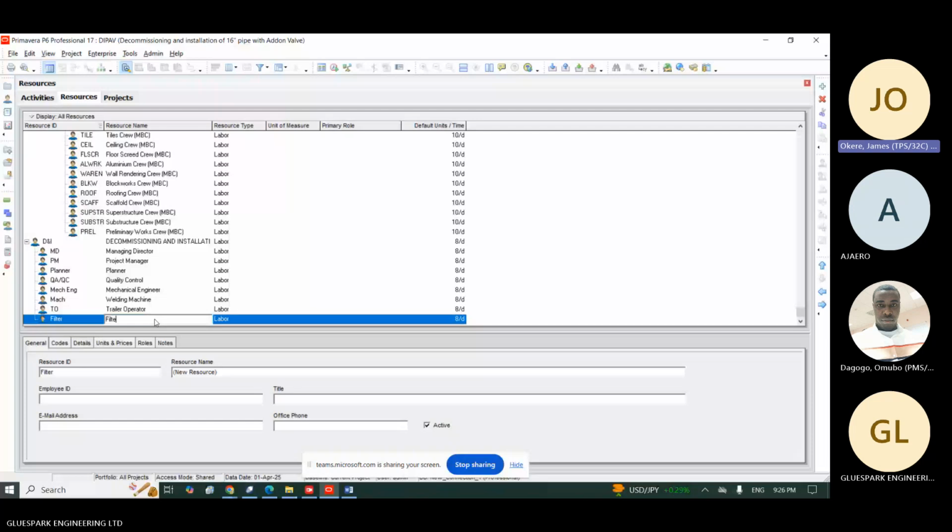So since it's 2 persons, I'll come here, I will put 16. So 16 means 2 persons. It means each time these people are working, it's going to tell me that the effort they are going to put is 16 hours, not 8 hours. And when all these ones, project manager and whatsoever is working, they are putting only effort for 8 hours.